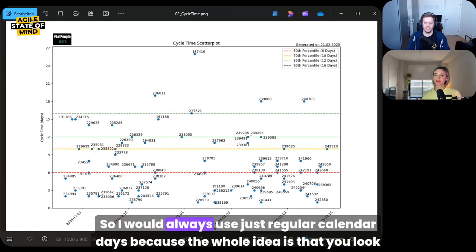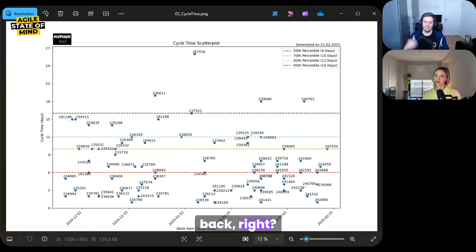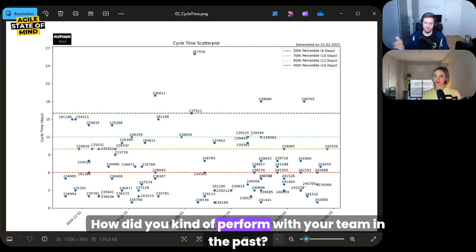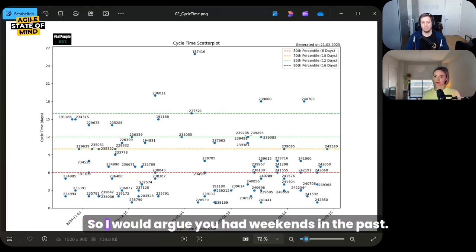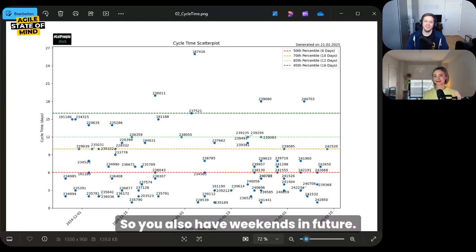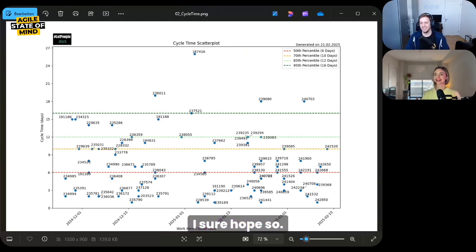So I would always use just regular calendar days, because the whole idea is that you look back, right? How did you perform with your team in the past? And then you can use this for predicting the future in a sense. So I would argue you had weekends in the past, so you also have weekends in the future. I sure hope so. You're right. You don't work all the time.